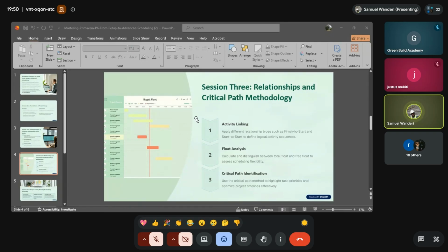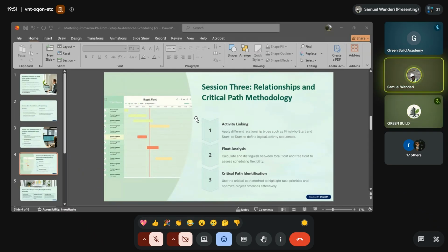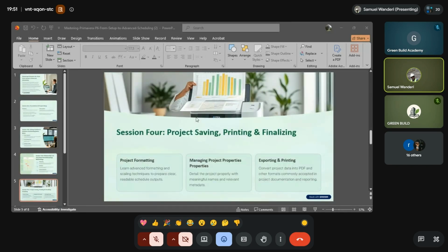You may find there's a holiday, or a day like Sunday or a weekend that you are not working, and in your scheduling you captured a critical task to fall under a weekend when you'll not be working. When a critical activity is affected, it compromises the whole schedule, which makes your project timeline not as accurate as it's supposed to be.